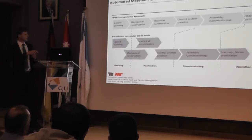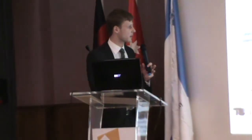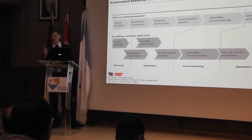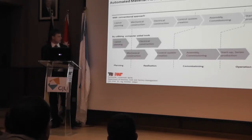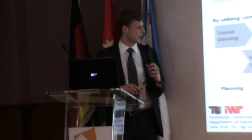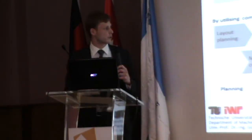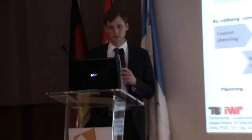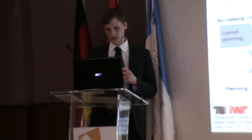Due to computer-aided tools, the overall time from the initial idea to start-up of series production was dramatically lowered, because different phases could be performed at the same time. For example, based on a CAD layout, we can influence mechanical construction while doing electrical construction in parallel. Meanwhile, we also have methods like virtual commissioning, which I will go into in more detail later.